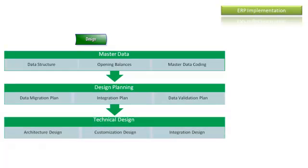We then move to technical design. The architecture design is a very important task, ensuring application high availability and that the application will be reliable for the company. The customization design is a cooperation between the application consultant, technical consultant, and business process owner — they translate customization requirements into screen forms, tables, business logic, and interfaces with the standard application. Integration points — whether internal or external — are identified, along with how they affect the business process flow.